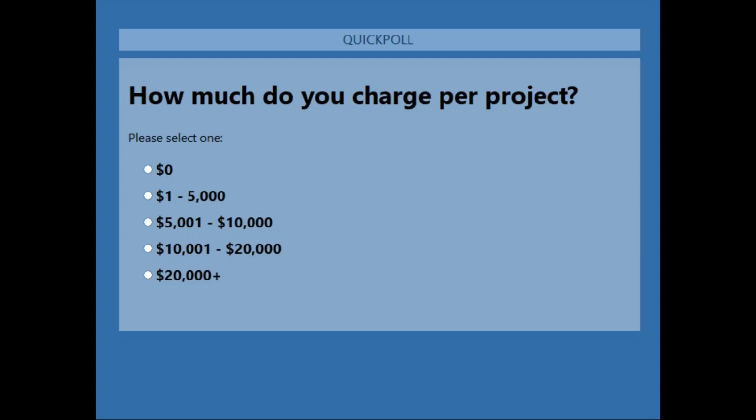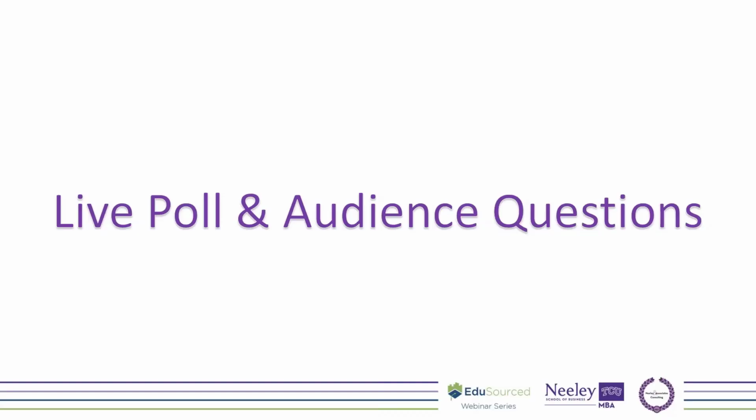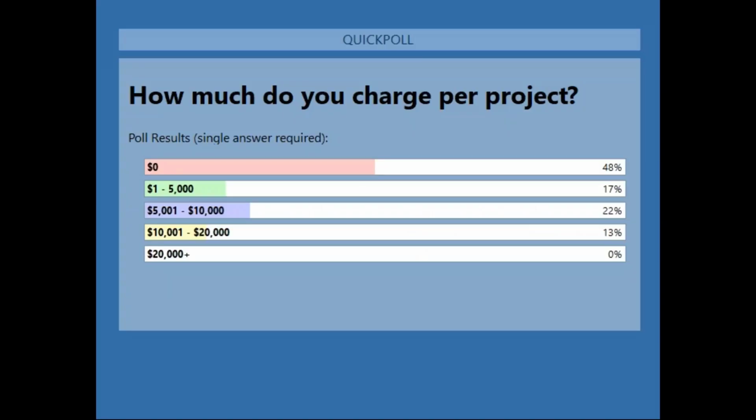Okay, and the next question is, do any of your projects require NDAs? If so, how are your teams able to present the different panels while adhering to those NDA commitments? Yep, great question. So obviously we tell the clients about all of this, and we ask the clients, do you want these other parties to be involved? And if so, then we get them to sign the same NDA as the student does. So when we put the panels together, we have to make sure that not only do they sign an NDA, but also that we don't put anyone in a panel that could potentially have a side interest in some fashion.